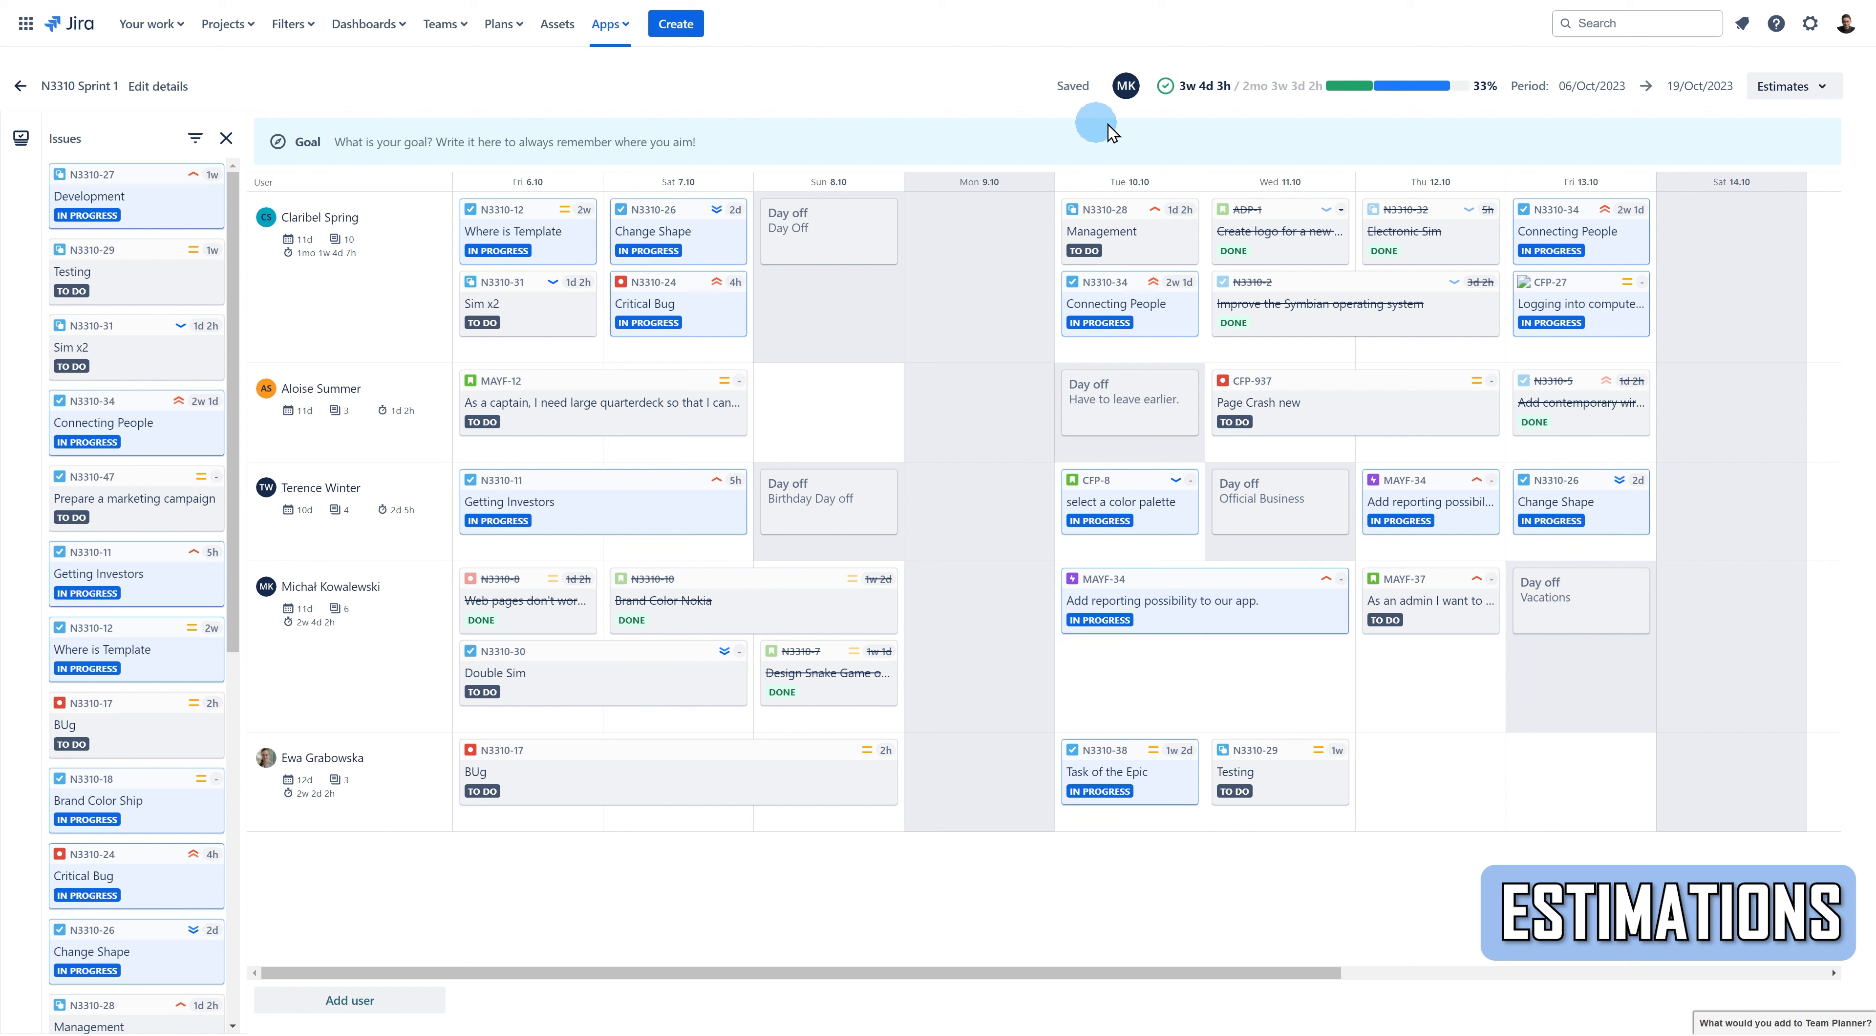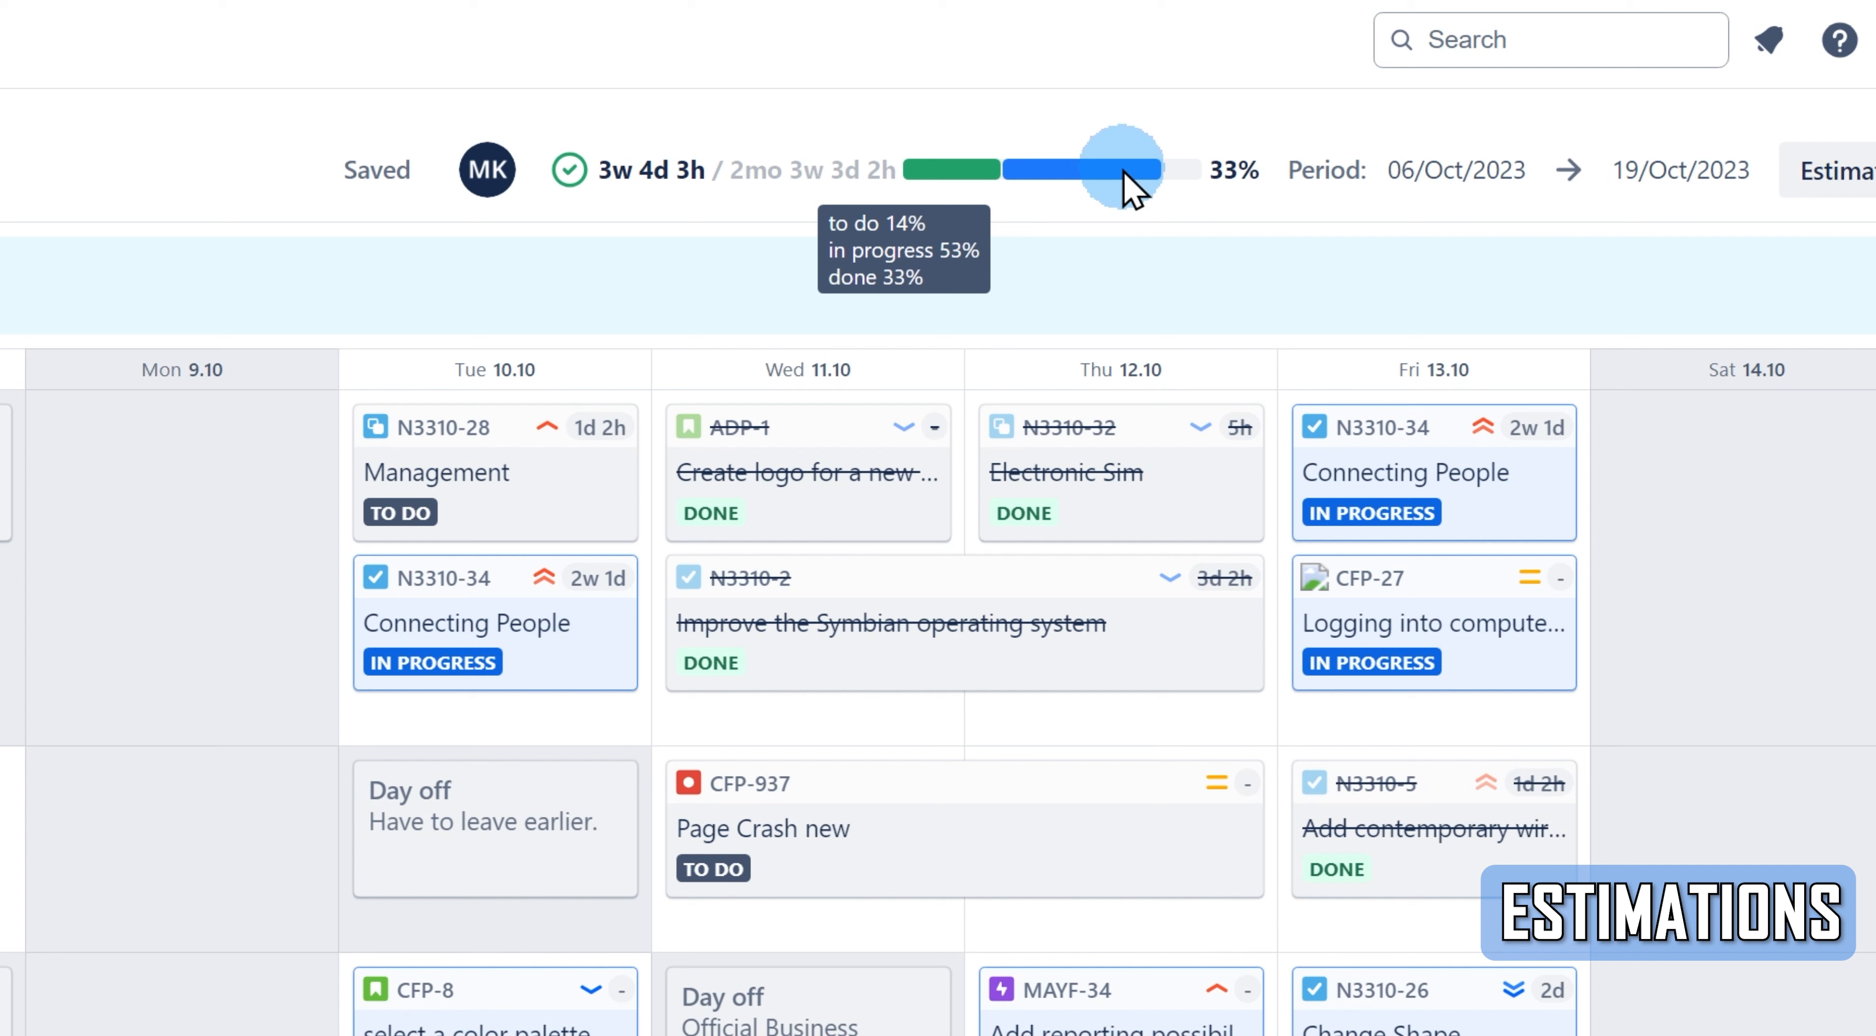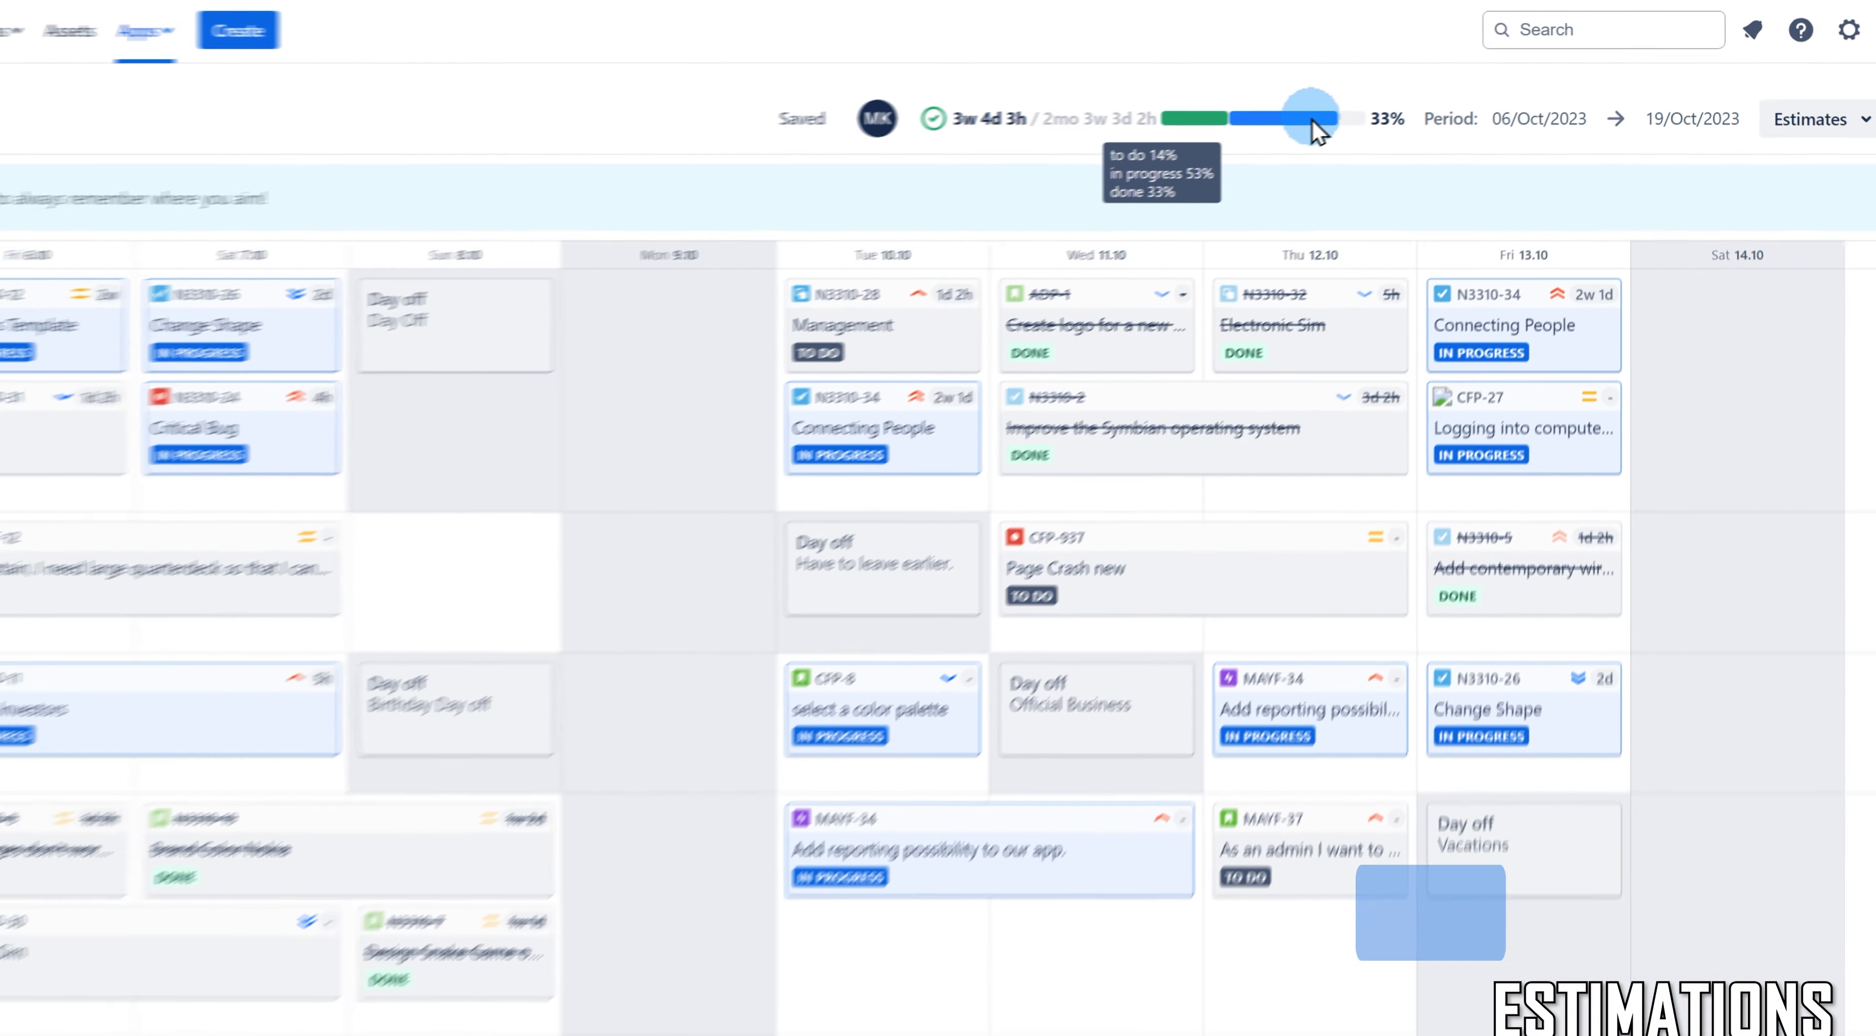There's also a progress bar of the plan related to the current displayed estimation option. It shows you how far you are from completing your plan. The statuses will calculate the percentages based on the JIRA issues, estimates, and status categories of the JIRA issues.